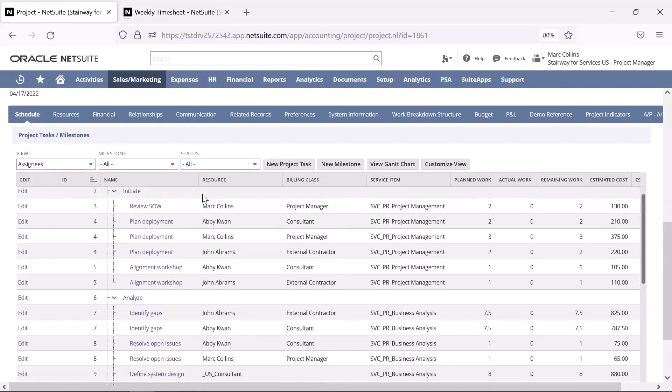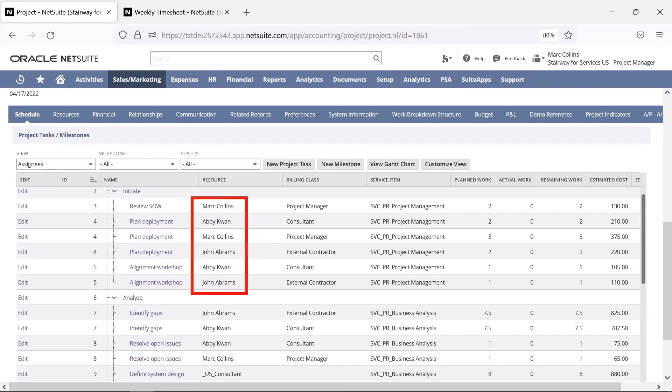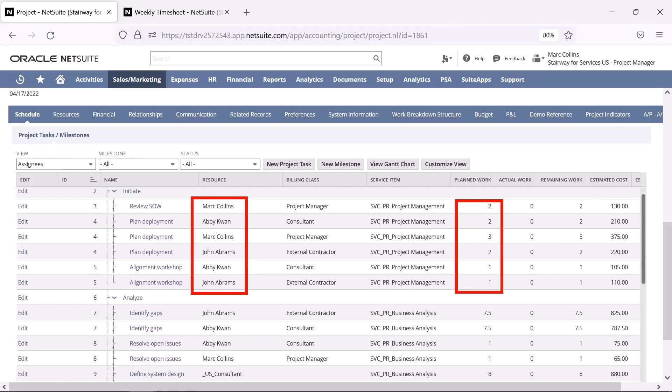Here I see my project plan, which shows who is assigned to complete the work and the amount of hours planned per person. I can also see the estimated cost to complete this work, which the system calculates automatically by multiplying the hours planned by the hourly cost of each user.